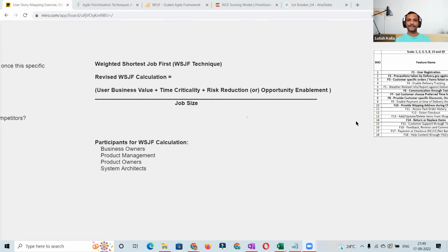Okay. Yes. Thanks. Yeah, and also the system architects play a crucial role when it comes to the time criticality as well, right? We might have some fixed deadlines or timelines, but what if within the timelines we might not be able to get it done on our own? Then we might have to go for third-party APIs or tools or existing source code or anything else. That is where the architects will be raising a question or a clarification to the business owners.